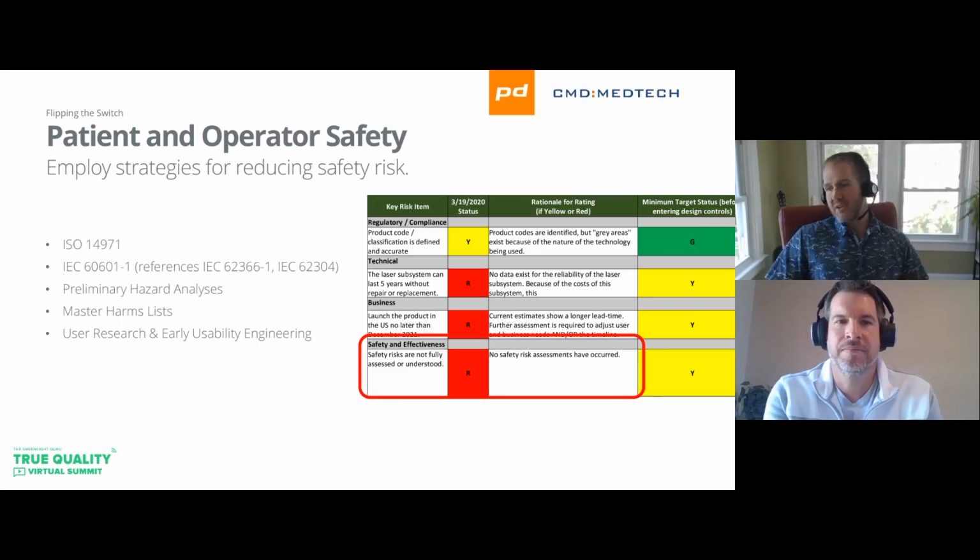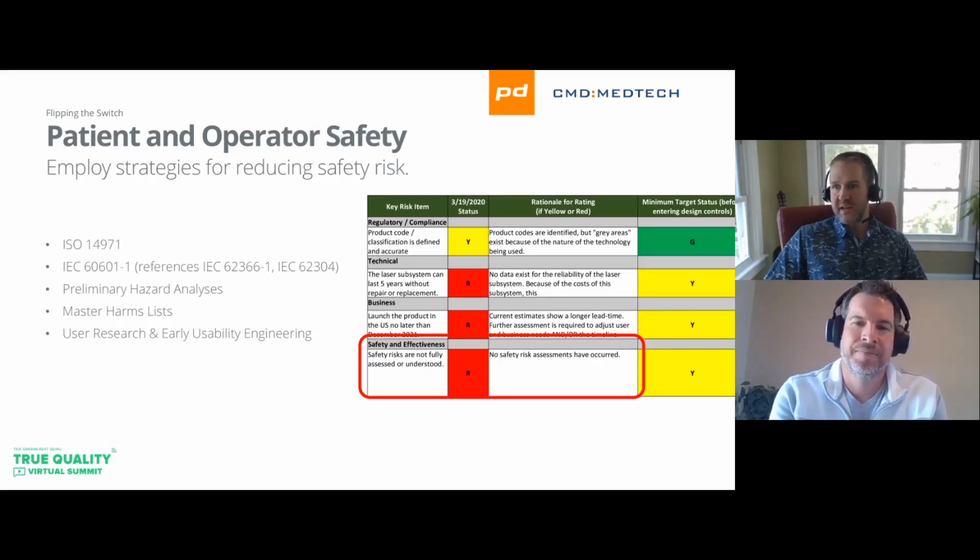So, if you're working in the medical device space, you've definitely heard of ISO 14971. There are a lot of other standards that integrate that risk management process, like IEC 60601. And they're all rooted in developing a safe product and really tie into that top level standard 14971. So I find the best approach early on in a project is what we call preliminary hazard analysis, which is really a top-down view of risks or expected risks for the product we're developing, where we start out and we just sort of brainstorm, okay, what areas could result in electrical shock, or where could we have a sharps issue or a mechanical hazard with this project?